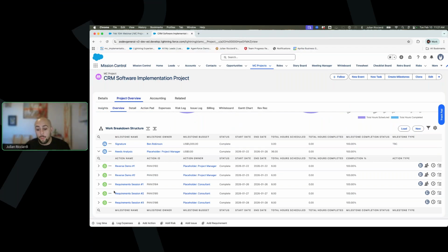So we do have a few different ways of staffing. It's not one or the other. You could choose what you want to do, and it's more a spectrum of how automated you want it to be. We have a fully automated flow. We have an auto assignment wizard where you're able to get a percentage match fit of who might be the best fit for each one of these actions based on skills, teams, capacity, proficiency levels, all that fun stuff, and then basically fully automated. This could happen at the opportunity. How I created the project earlier, it could be all automated from exactly that touch point.